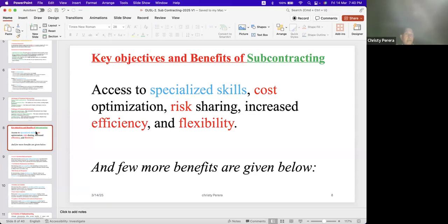And here, these normal subcontractors are taken by the main contractor or prime contractor. He's the one who decides on that. The client won't interfere. Sometimes the client will interfere, but in normal cases, we don't interfere. We have allowed the main contractor or prime contractor to take his subcontractors and discuss with them how to pay and all these things.